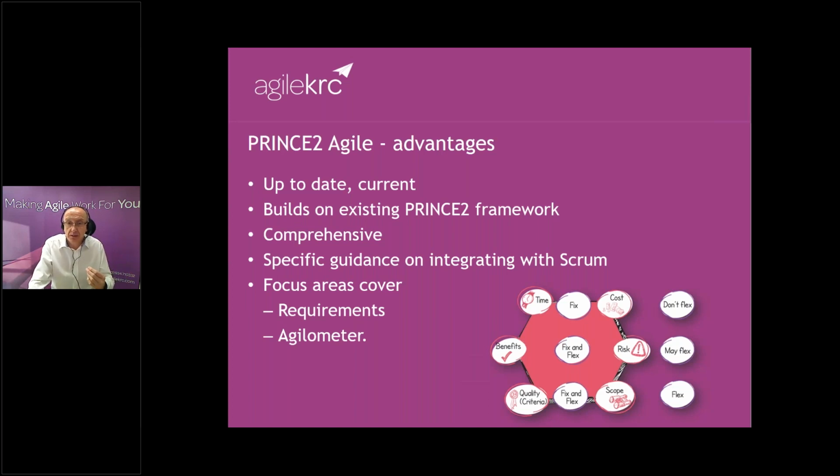Now, in DSDM AgilePM, they have something similar called the PAQ, the Project Approach Questionnaire. It's 20 odd questions, you go through them, and again, it's a risk assessment. What are the bits that we need to look out for? A good question is, how much business engagement or customer engagement are we going to get on this project? Now, if the answer is not much, you're opening up a big Agile risk. Ironically, if you ran it waterfall, traditionally, actually, just get them to sign it off and we'll build what they've signed off. So if you swap the risks, there's a different set of risks with an Agile style project compared to traditional.